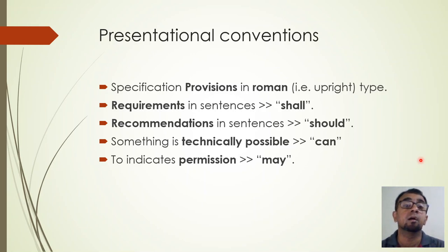Remember, not all BIM models are appropriate for costing purposes. Especially if the model is not exported to IFC using quantities add-on, you may not have appropriate quantities for certain software that quantity surveyors are using.